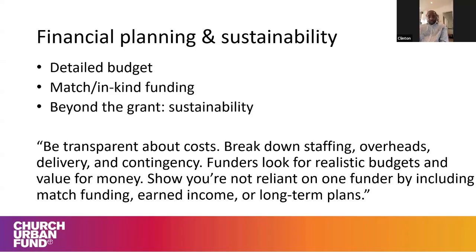Strong financial planning demonstrates that your organization can manage funds wisely. It's also about linking money to mission. Every pound should contribute to outcomes. Include all relevant costs, not just direct delivery. As I said, admin, monitoring, evaluation, and having reserves and multi-year forecasts reassures funders that you're planning beyond the life of a single grant. What funders want to see now is not just, we've given you a pot of money, go out and do what you're doing. They want to also see if you've got some tools in place to make your project sustainable after you receive that grant. And if that doesn't make a lot of sense, I can always explain it to you after.